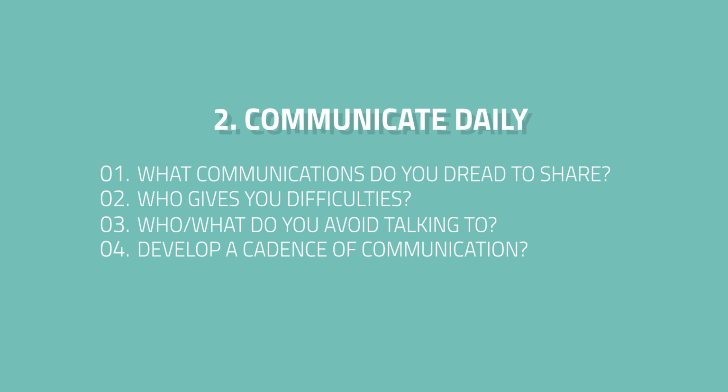And then I want you to develop a cadence of communication, a regularly scheduled communication. So if you have meetings that happen once a week, go ahead and schedule those. Every Tuesday at 10 a.m., this is our meeting. Every Thursday, this is the report I issue, or updating an information radiator, or whatever the case may be. That I do it on a regular basis. I anticipate that, and then the recipients of that communication can anticipate it. But communicate daily. You have to take it head on to be an effective project manager.